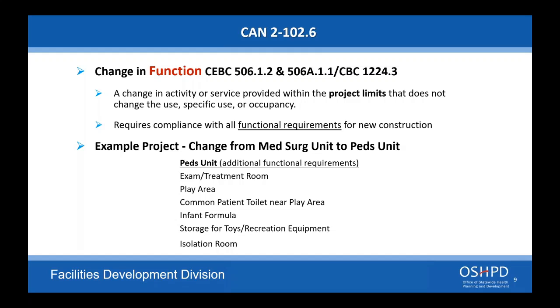kind of borderline, and or if there's one or two items that alone are prohibiting the use to remain as a diagnostic, so that you can make the decision that, well, we won't do those procedures if it's going to trigger a lot more construction. But basically, the functional program is required to be filled out with the list of procedures, and we'll take it from there.